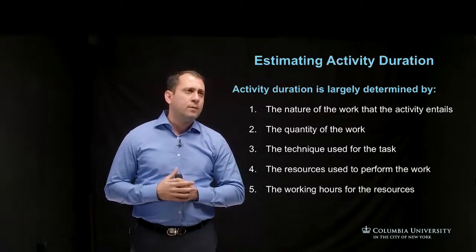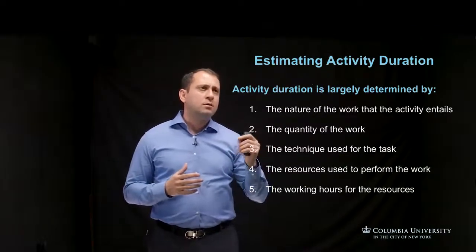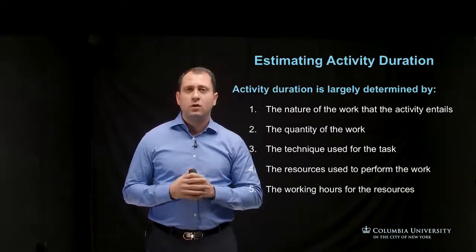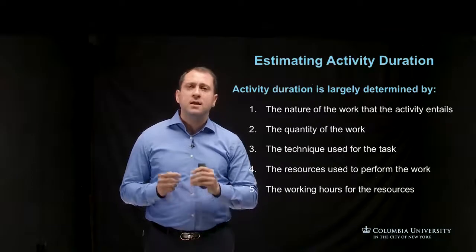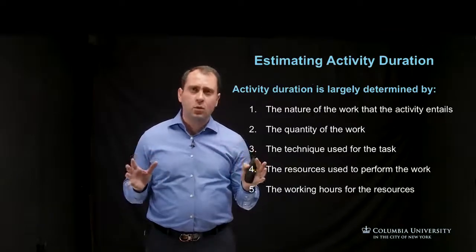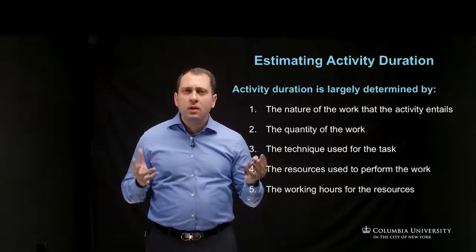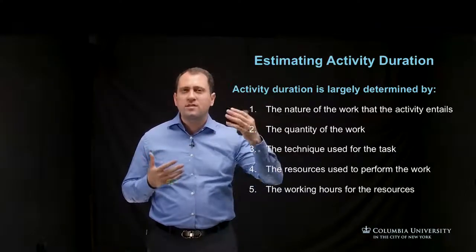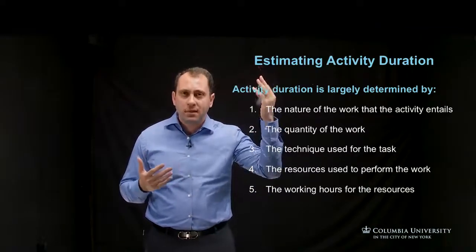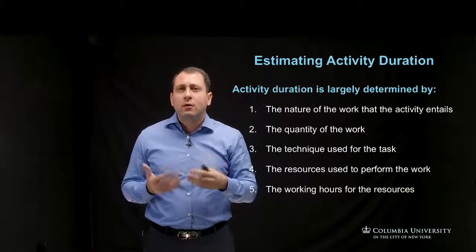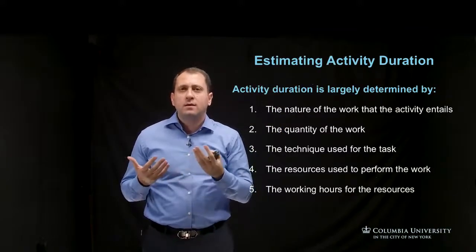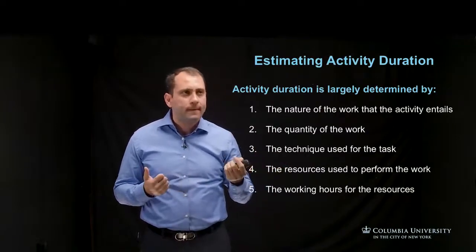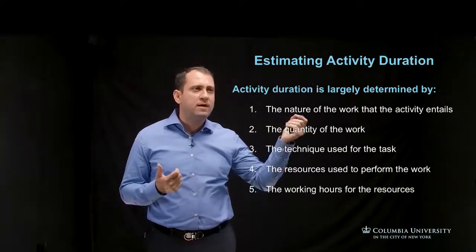The first one is the nature of the work that the activity entails. What we mean by that is, if all factors are equal, to pour concrete on the 20th, 18th, or 17th floor of a building will take longer than pouring concrete to the third floor. So this is what we mean by the nature of the work.